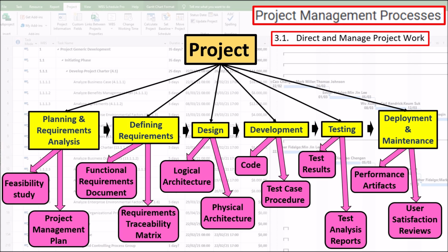This process is responsible for 1. Leading and executing the work defined in the project management plan. 2. Implementing approved changes to achieve project objectives. 3. Performing change control to verify that any scope changes identified for this deliverable were implemented as approved. 4. Collecting information about the performance observed during the execution of the activities performed to produce a deliverable.